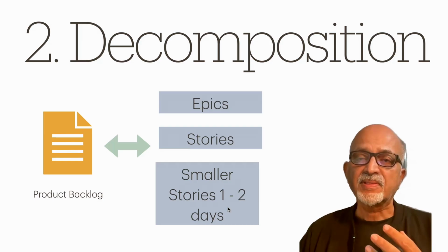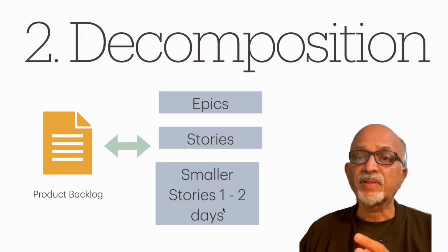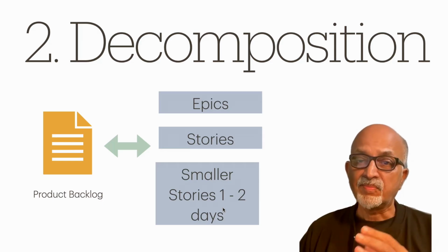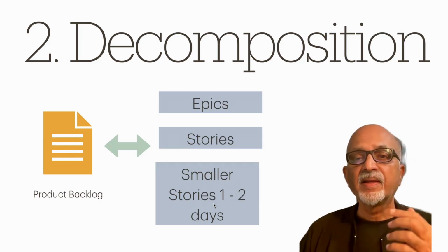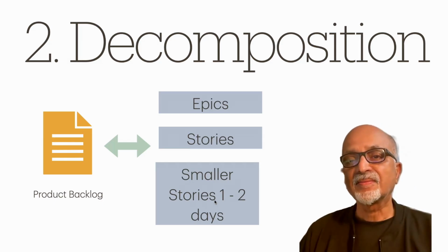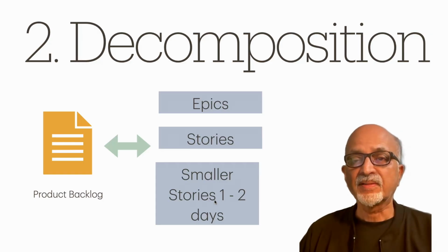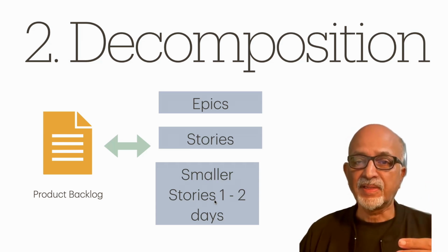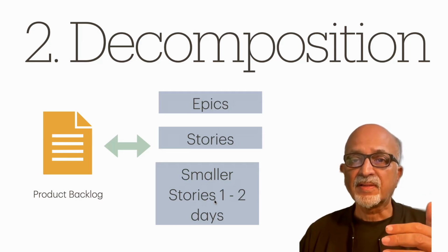This is a question people ask very frequently: what should be the duration of completion of a particular story? How many days can a story run? The sprint is a very small thing. So, in a 30-day sprint, it is better not to have a story which is running for 20 days or 25 days. And in the last minute, if that story fails, then the agility is lost.